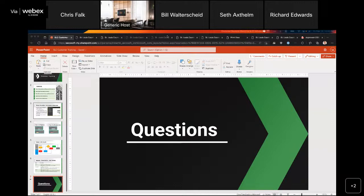Well, that was kind of brought up. You definitely don't want to change the sheet numbers from your original submission to a resubmission because we lose some formatting. So you definitely would want to include it as a new sheet and not switch your sheet numbers around.